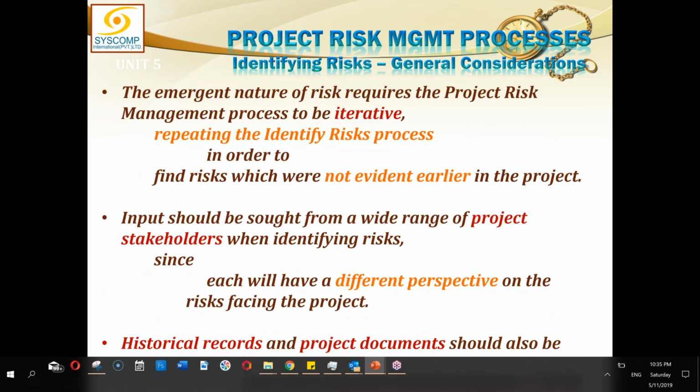General considerations for identifying the risks. The emergent nature of risk requires the project risk management process to be iterative in nature, repeating the identifying risk process in order to find risks which were not evident earlier in the project. So we will repetitively keep doing the identification process, and we keep processing those risks.